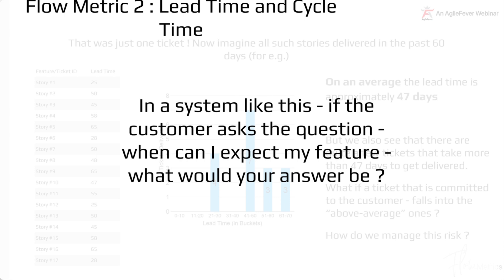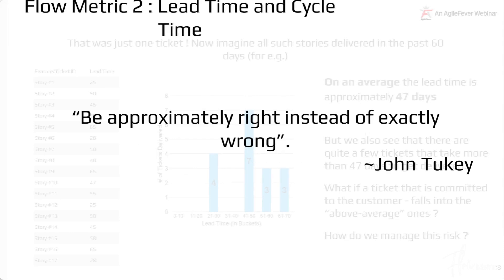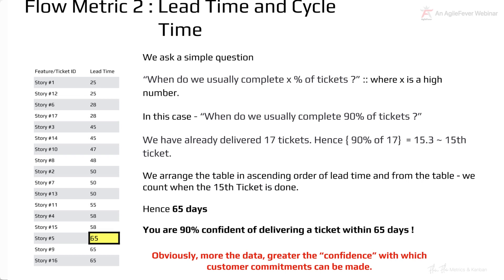When the customer asks 'when can I expect my feature?', what would your answer be? Let's be approximately right instead of exactly wrong. The average is 47 days — that is true. But we should ask: when do we usually complete a high percentage of tickets? Lead time is a post-factor metric, meaning you can only measure it after the event has completed. I typically take 90% as my benchmark — when do we usually complete 90% of tickets?